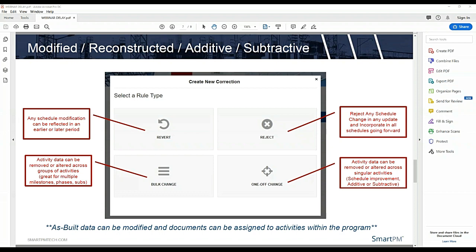The other thing that we can do with that same change is analyze subs. For every sub, we can go to their last activity, create that as the point to be analyzing delay, and now we can see every sub's story that may be separate from the overall holistic job, like what impacted a sub. And then there's the ability to do what I call a one-off change.